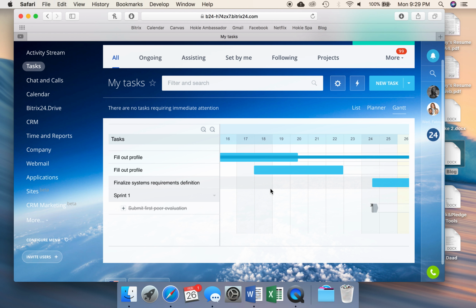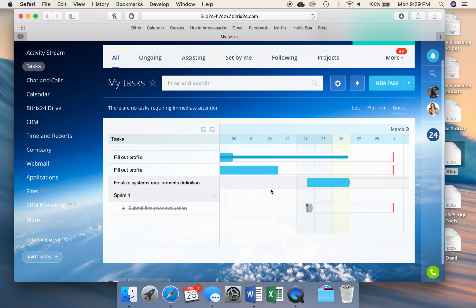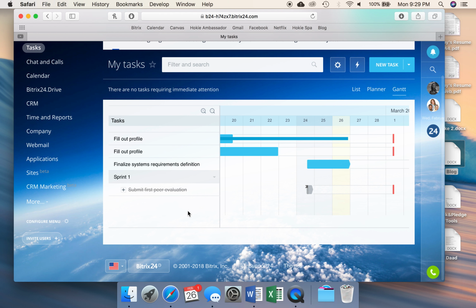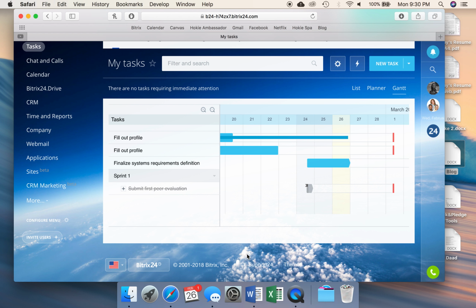Especially as you get further into a project, very intricate projects and projects that require layering. So, for example, when I add Sprint 2 into the Gantt chart, which is something I need to do very soon, I'll say that Sprint 2 cannot start until Sprint 1 is complete, because Sprint 2 builds on Sprint 1. Sprint 1 is the foundation.